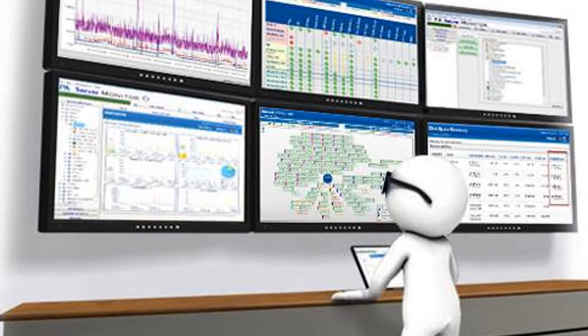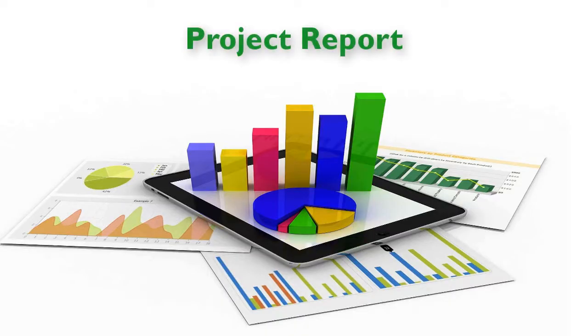Reports. After the set time intervals, reports of the current project status need to be prepared. The time interval can vary depending on the type and project duration. A common reporting interval for shorter projects is a month, for lengthier projects 3 times per year or once per 6 months. The reports serve several functions and are managed by multiple people. It is important for group members who execute the tasks to gain insights into the complete project and influence the implementation. The report is also important for company management or the buyer because it enables an overview of current execution and offers a consistent evaluation regarding achieving quality and use of budget.